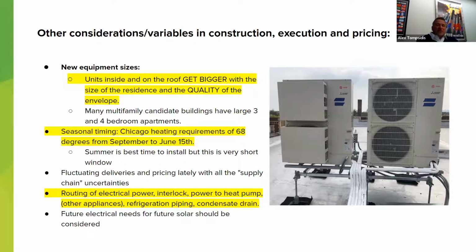We've got to get all our stuff up, because remember, all 3 or 4 units need to be done on the same day or 2 days and started, because you can't leave one unit as gas. Everything has to be done. So you got to have a crew size there that's going to make sure that everything happens. If you run into some problem, you need to fix it.